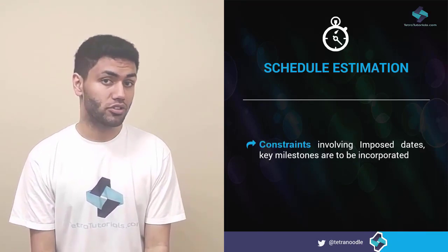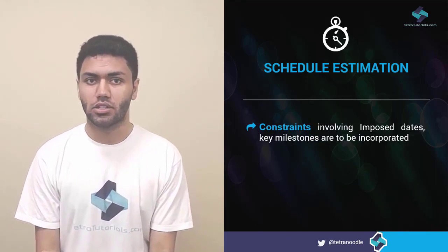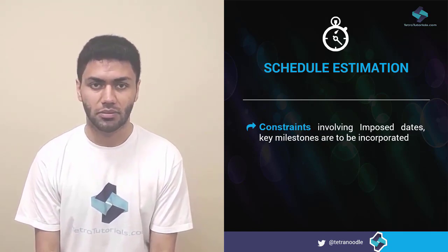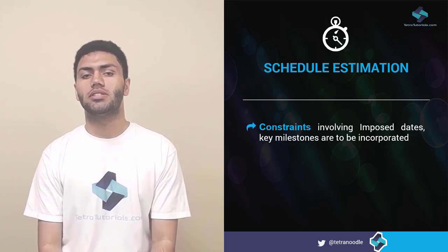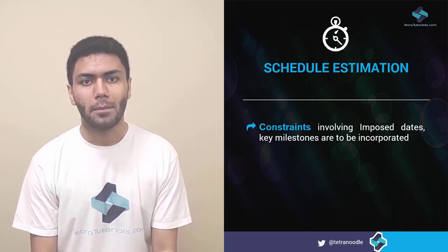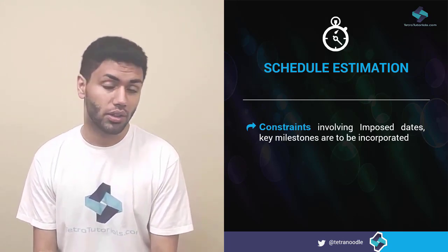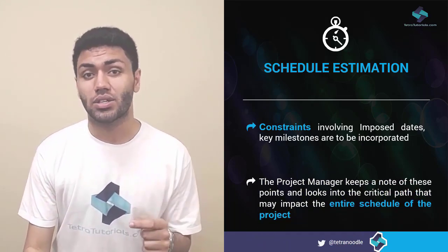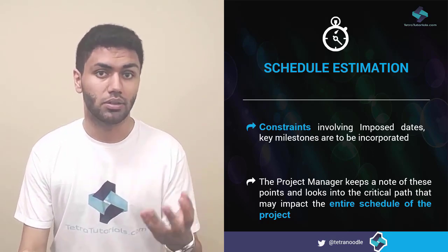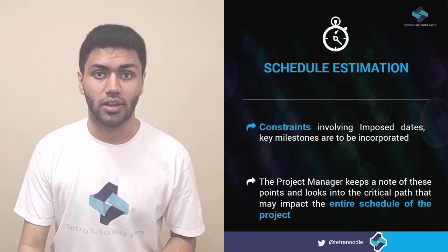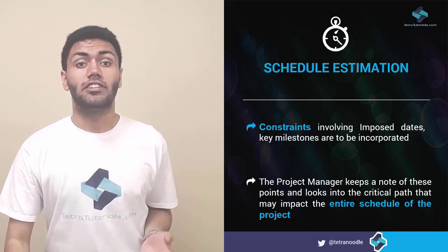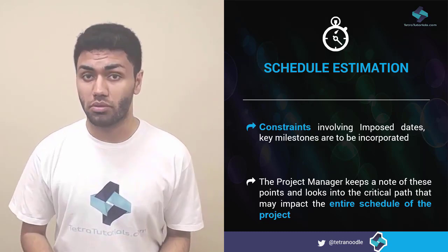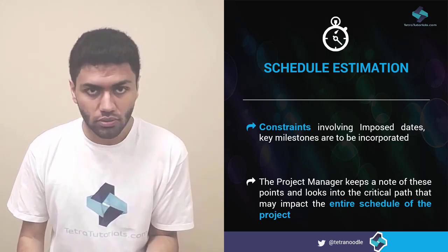Estimates and other factors provide a basis to the project manager to come up with an acceptable timeline to complete the project. But sometimes, this calculated timeline may be too long or not acceptable for other reasons. Under those circumstances, the project manager has to take into account other means of completing the project within the specified time limits. For example, if the time is more important, then the options available for the project manager are increasing the number of people on the team and thus the cost.